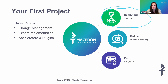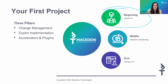So you want to meet with your sponsor and set the expectation early that they need to be there throughout the whole process for this to be a success. Once you've secured a sponsor, you want to raise awareness early with all of the impacted user groups that are going to be using this system. Instead of looking at the individual, think about the organization and the readiness of the organization for a change. We're in a really digital-transformation-heavy time right now. You have to think: is my organization ready for change? Do we have a lot of change going on? Was there just a previous large change that people are still getting used to?